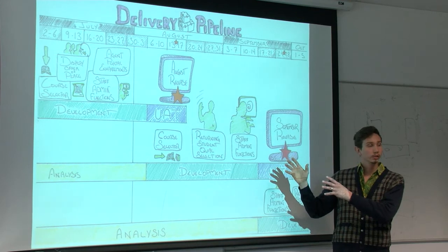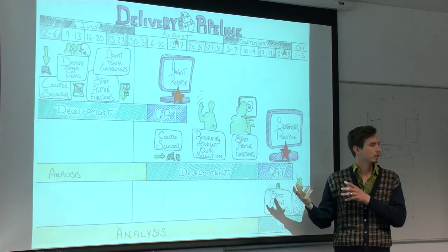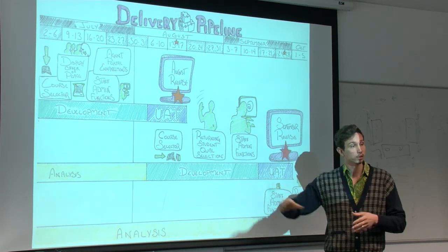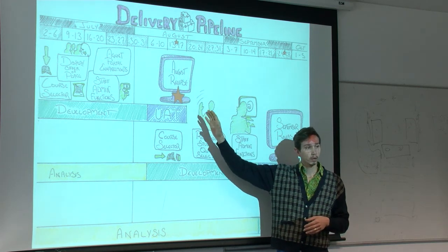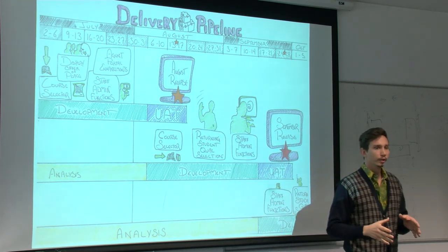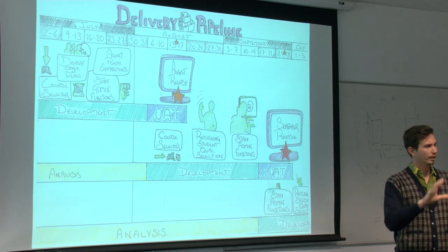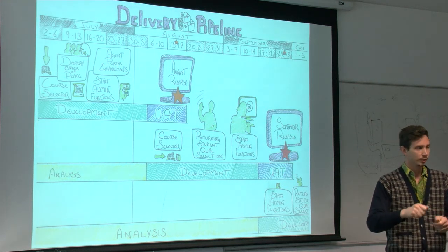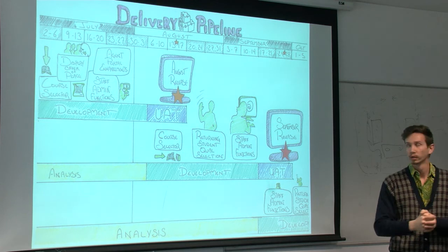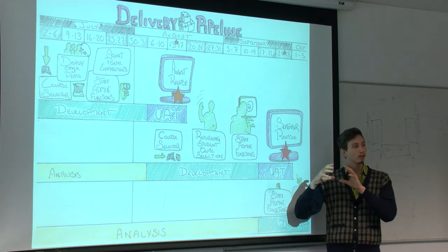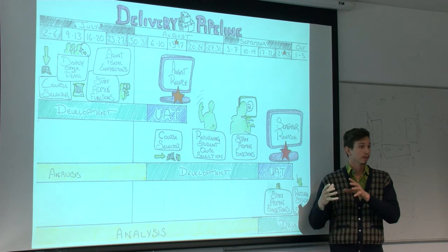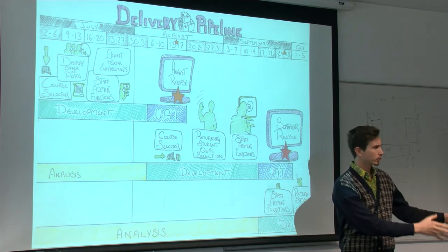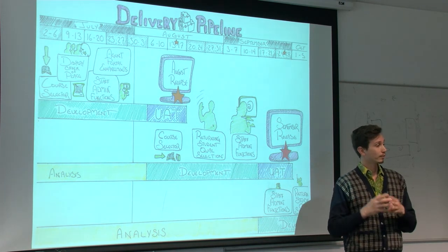And as far as the priorities go, if there are things that you think, where is this or where is that? I really think this is more important than that. The way that we currently do our priorities is we take all of the prioritized epics, which, if you remember the way that we work in Agile, you have initiatives, and then epics or features, which are kind of synonyms, and then stories underneath that make up the technical tasks that go into creating that feature. So those epics, we need those prioritized by you, by the business. And the way that we get that final sign-off, especially because there are things that some parts of the business really need, but other parts don't want or don't need, is we have what we call a DMA.